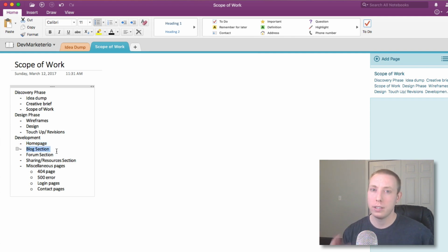The blog section will take, let's say, another week. So then April 14th, and so on. So you can just continue on. You set deadlines for yourself and everything like that. And then this is what will get approved by the client. And then you can make sure that we're on schedule.